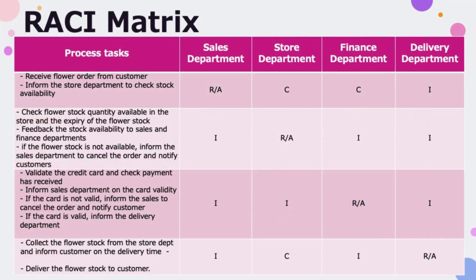You can easily create a RACI matrix on PowerPoint by creating a table. The sales department will be the only party that is accountable and responsible to receive flower orders from customers. They will consult the store department on stock availability and the finance department on credit card validation, and inform the delivery department on the new order.